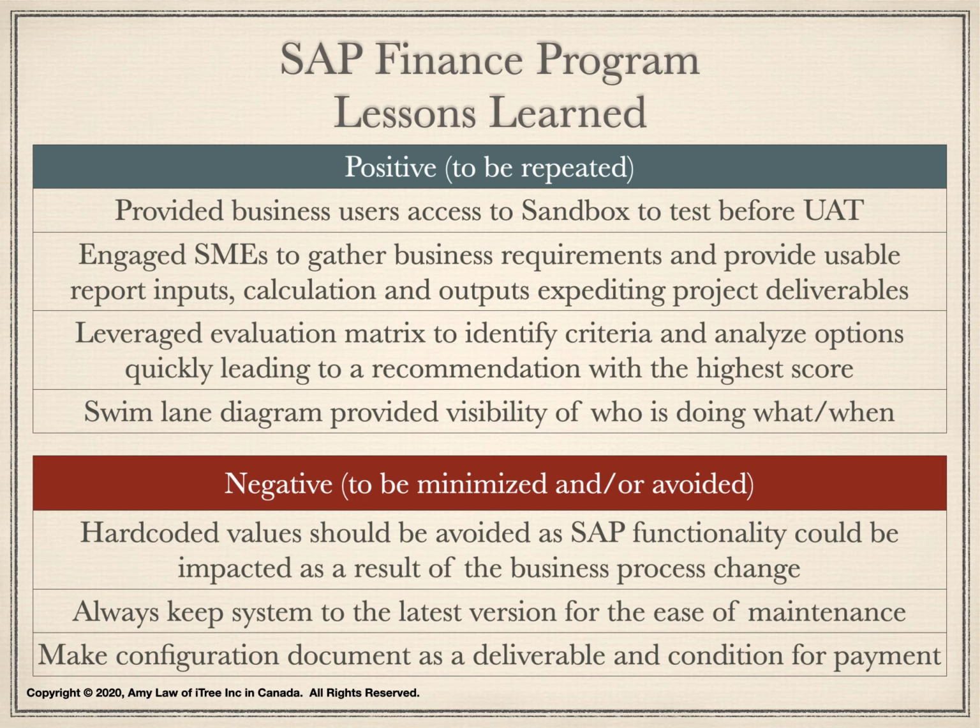We leveraged evaluation matrix to analyze implementation options, leading to a recommendation with the highest score. The evaluation matrix serves as a reference when questions arise about priorities, resourcing, equipment, schedule, and funding.